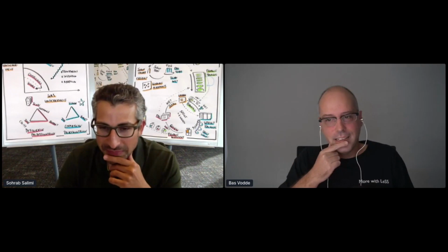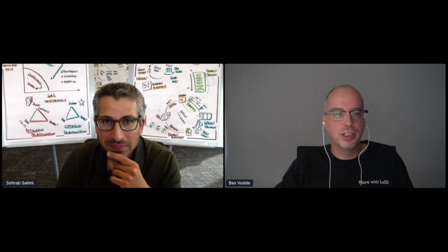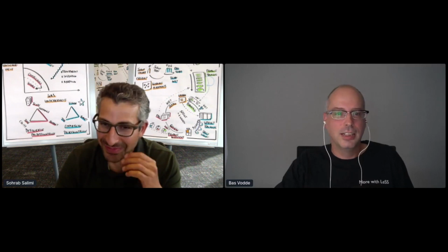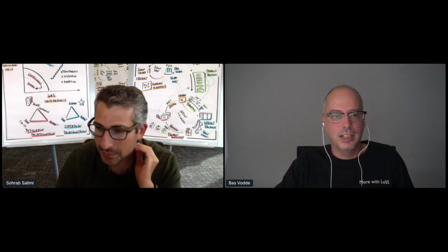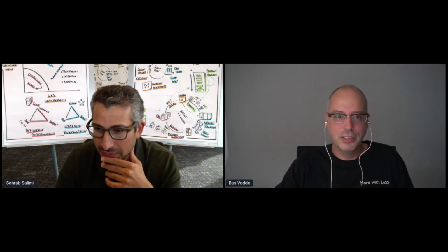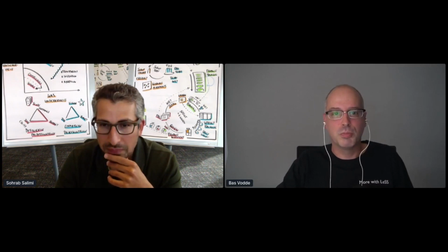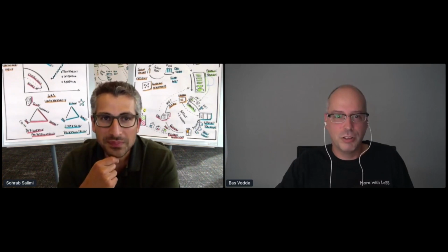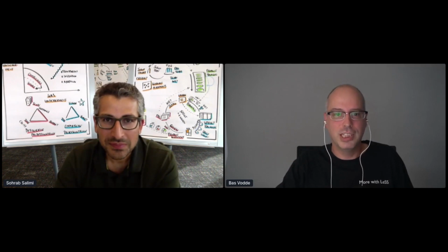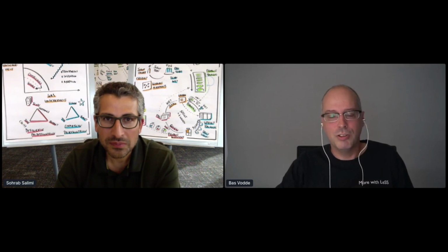Well, it is both extremely simple and extremely complicated, right? It's extremely simple because, since you're not going to have new people and you will be working with the people you have right now, the change from component to feature teams is mostly about learning and skill. Therefore, roughly the two choices you have are to restructure your teams into feature teams, or use your existing teams and accept the significant amount of learning that the existing teams will need to do.